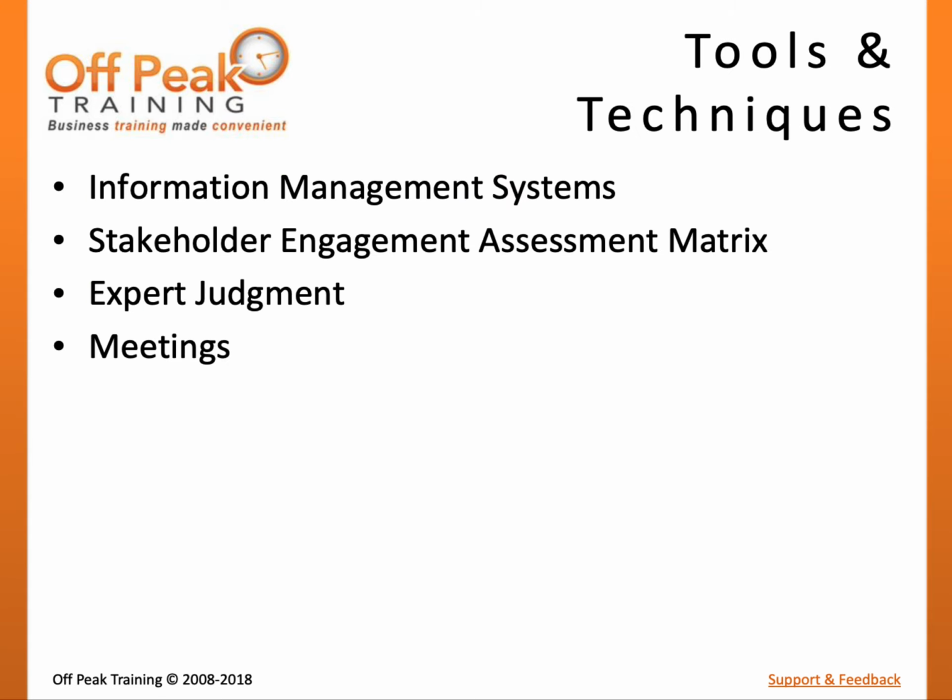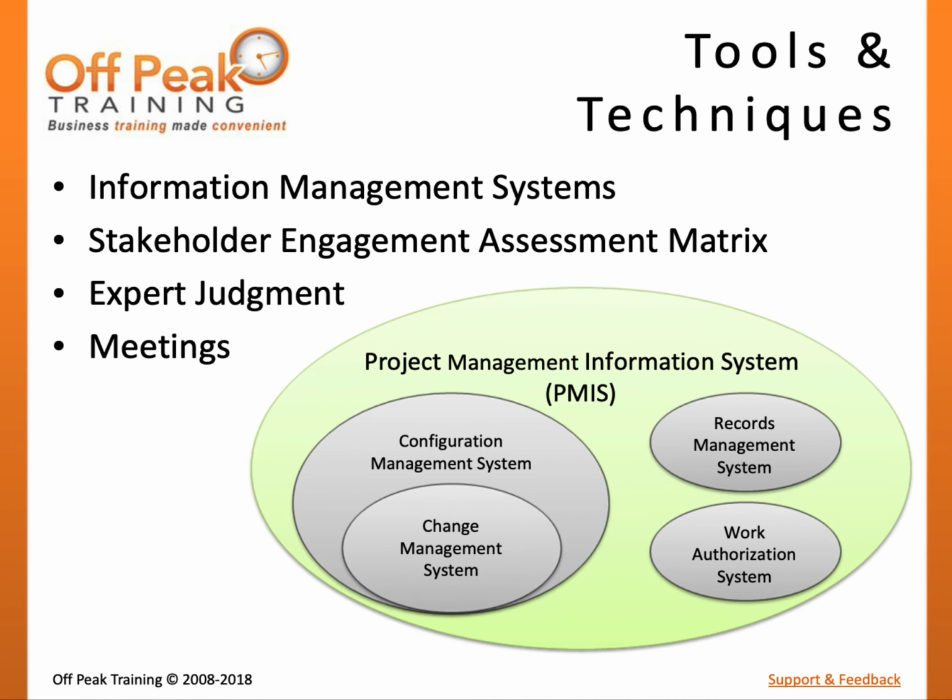There are a few tools and techniques defined for the monitor communications process. Information management systems include a variety of tools to help the storage, retrieval, and distribution of project documentation and other project information. These can include physical and electronic formats and may be part of the overall project management information system. The stakeholder engagement matrix helps to map the desired and actual engagement of project stakeholders. It will be discussed further in the modules for stakeholder management in Chapter 13.